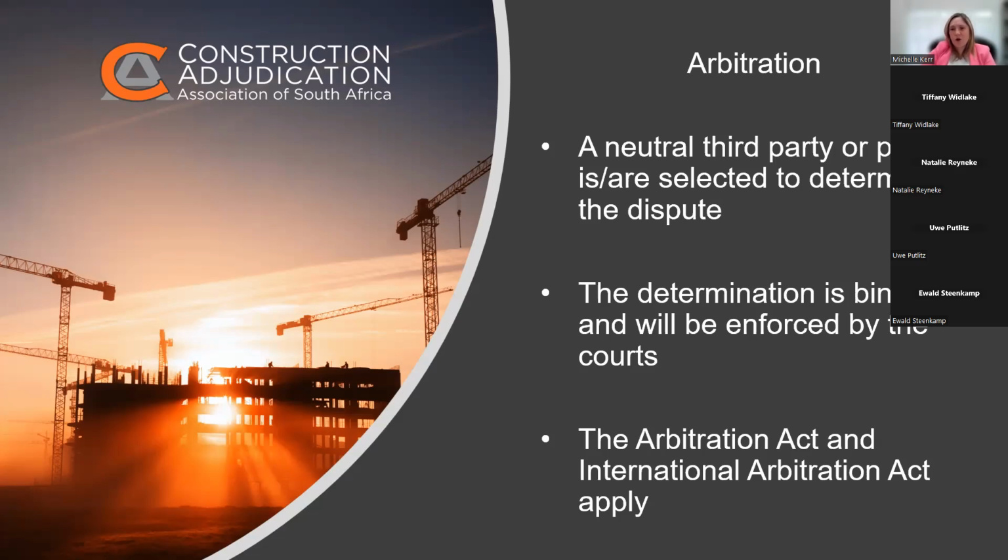Most parties want arbitration, well, the first arbitration, to be the end of it, because they have already followed their tiered process of amicable settlement or negotiation or mediation and then adjudication and then arbitration. They don't want to have another procedure to follow thereafter. But it is available depending on which rules you're following. But this process is usually the final one. The parties normally choose between arbitration or court. It's not normally arbitration then court.